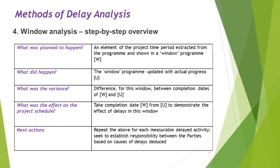Next, Window Analysis. What was planned? An element of the project time period extracted from the program and shown in a window program, W. What did happen? The window program updated with actual progress, U. What was the variance? The difference for this window between completion dates of W and U. What was the effect on the project schedule? Take the completion date W from U to demonstrate the effect of delays in this window. Next actions: repeat the above for each measurable delayed activity, then seek to establish responsibility between the parties based on the causes of the delays deduced.